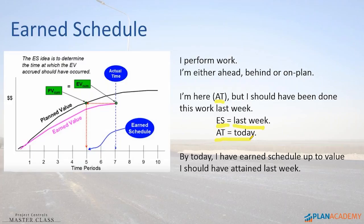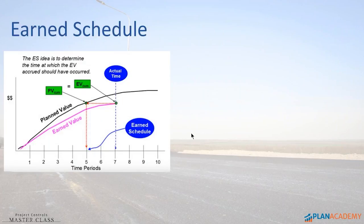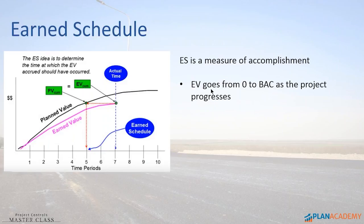ES — Earned Schedule — is a measure of accomplishment. It goes from zero to planned duration as the project progresses. Earned Value goes from zero to Budget at Completion, whereas ES goes from zero to Planned Duration — PD. The total duration of the project is called PD, Planned Duration, and we go from zero to the planned duration of the project.